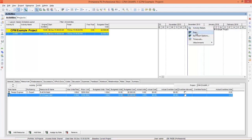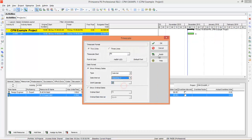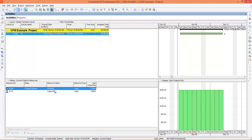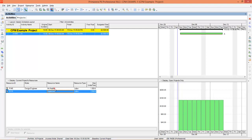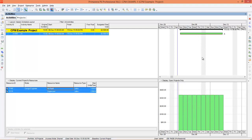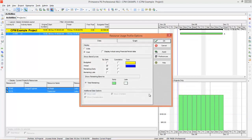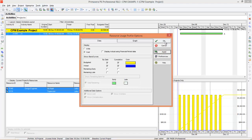I'm going to change the timescale to week per day and press Apply, so it is showing day by day. You can go to the Resource Usage Profile and see how resources are assigned — this is Mr. Nabil and this is Supervisor. If you want to generate curves you can right-click and go to Resource Usage Profile options. Change the options to Budgeted by Date and Cumulative, Actual by Date and Cumulative, uncheck Remaining Early, and press Cost. Press Apply and OK.